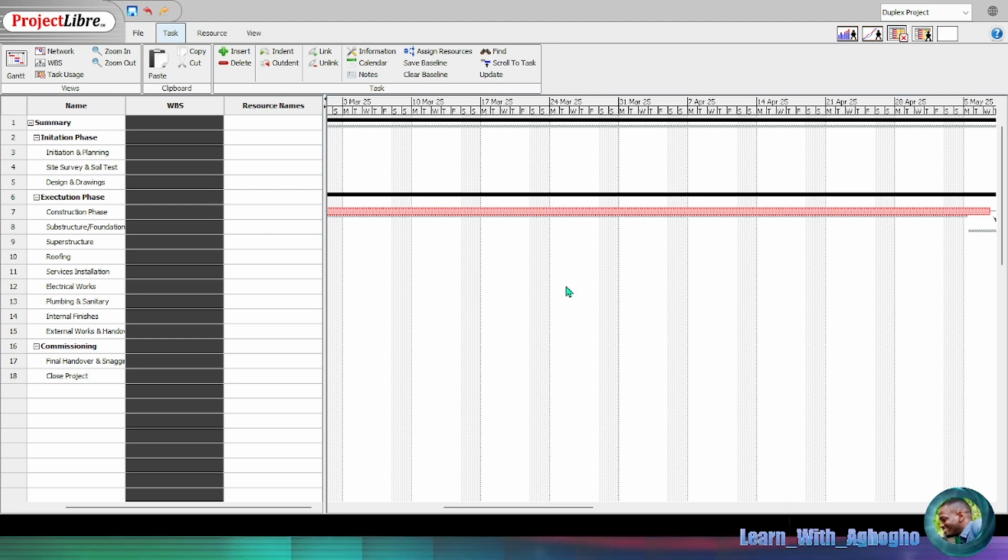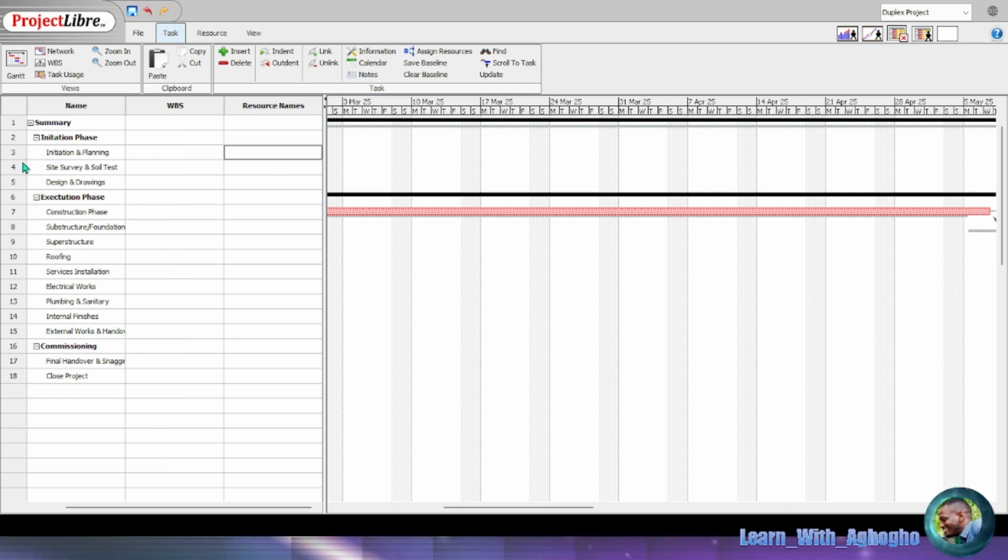So let's quickly assign the resources to these various tasks. On the section where we've got tools, I will only assign them once in each of the phases, because I'm considering the fact that these tools will be used throughout that phase, so that when the system does the budget calculation, it will give an accurate value.